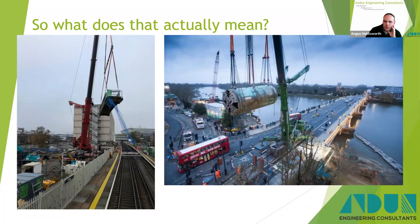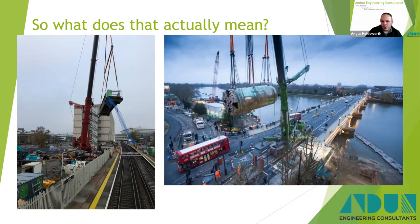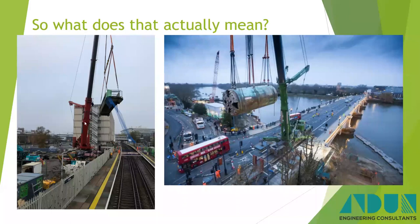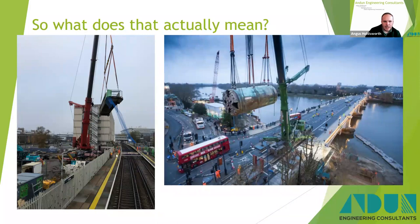Assessment of structures in the temporary condition — in this case Putney Bridge: assessment of the abutments where the rear outriggers stand, assessment of services underneath. There would have been some assessment of the lifting arrangement, but the lifting eyes came as part of the TBM package. On the left-hand side there's a mobile crane operation lifting out a bridge — the temporary stability of the supports left in for the bridge, a crash deck to protect the railway, the crane position, and planning how to actually achieve the demolition works.